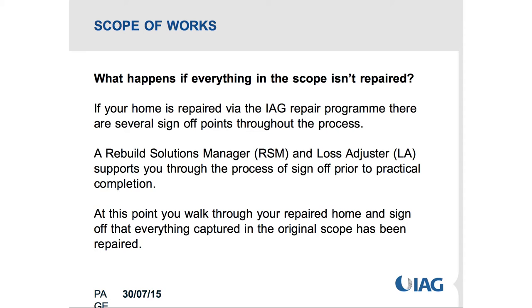One of the questions was: what happens if everything in the scope isn't repaired? The scope is the point in the process where you are most involved. Before any repair is undertaken, a scope is done and the builder and your loss adjuster will walk through the home with you. That's your opportunity to make sure that all earthquake damage is captured in the scope. Once the scope is agreed, your insurer will cost the damage, and then have a conversation about whether you cash settle or continue with the repair.